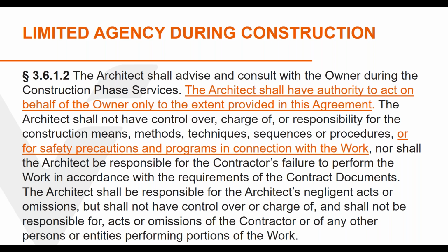And note, if the contractor is working under the AIA 201 set of general conditions, the owner supposedly had the contractor both add the architect as an additional insured on the contractor's CGL policy and indemnify the architect for harm caused by the contractor's negligence. So that language in A101, 2007, in the insurance exhibit, for instance, for the additional insured status, can be very helpful to protecting the architect from bodily injury claims from workers or from third parties.